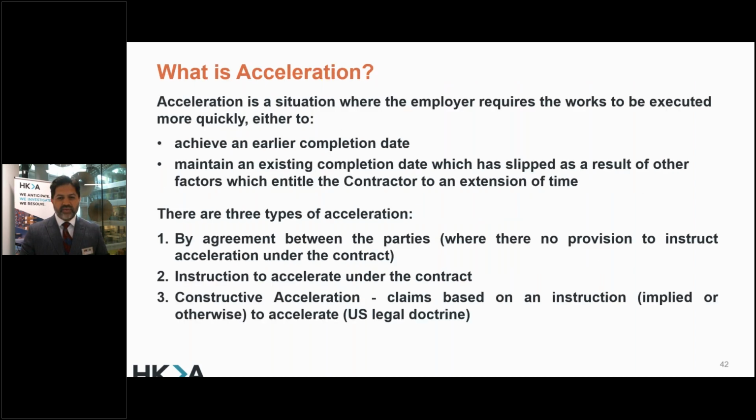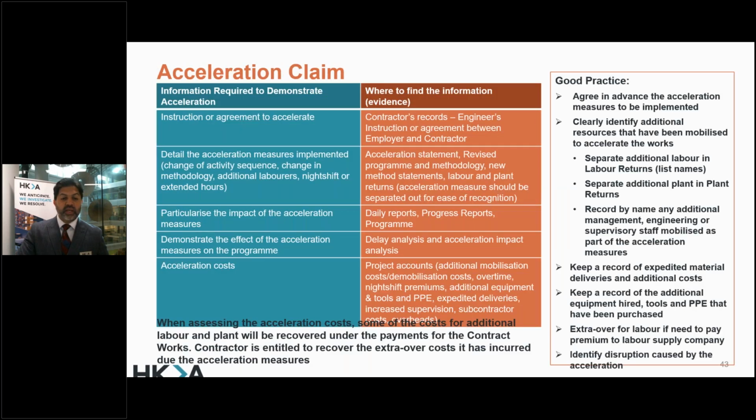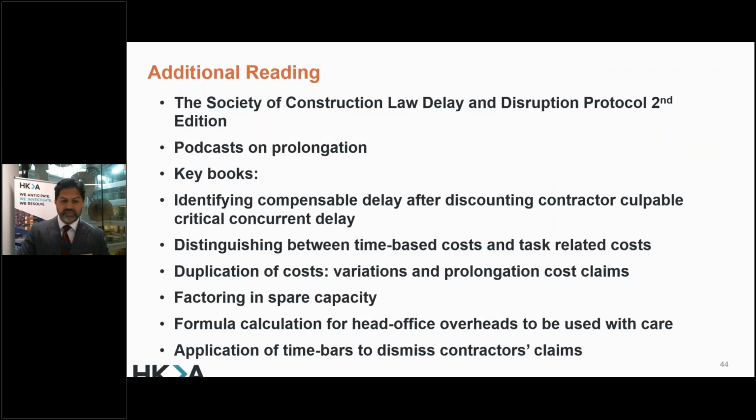Okay, now acceleration, I'm going to skip, but you can just look at it later on. It's basically when you are trying to recover a slipped program, whether the contractor has been given an instruction from the client or not, you are trying to put acceleration in. And you need to look at specifically whether you have an instruction to accelerate, whether there is enough data available, whether you've been given a written instruction from the client, or can you recover the cost of acceleration.